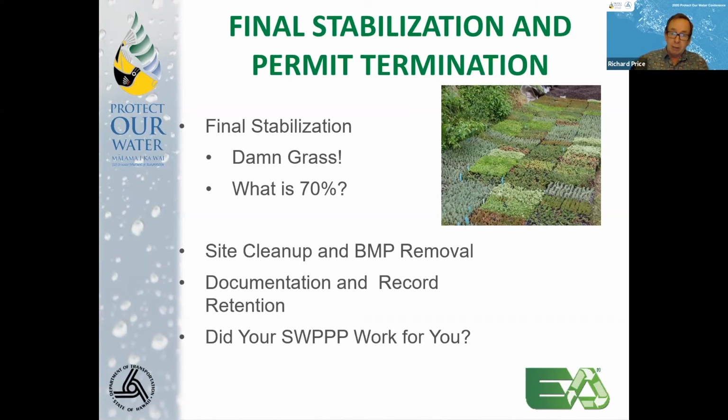And then documentation and record retention. Obviously, all the way through, you've documented everything. Keep those records in case there's questions down the road from somebody. And then, I'm very big on lessons learned. At the end of a project, did your SWPPP work for you? What didn't work the way you would have liked, and what would you change if you had to do it again? And how can you learn from this for your next project going forward?